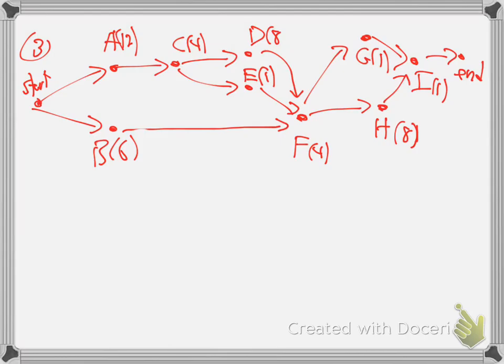B was 16. All right. So how do I, for critical path, how do I put stuff on there? Remember, that's the boxes. We only did this once, I think, so I wanted to show you one more before I hand you that exam. You start at the end, you put 0 with the box things, and then you add backwards. Remember that? You're trying to find the highest number paths. So we add backwards, go back to here. I'll put it next to the I. Every number is going to end up having a bracketed number in addition to the parenthesis number. So you start at 0, run the arrows backwards, add as you go.